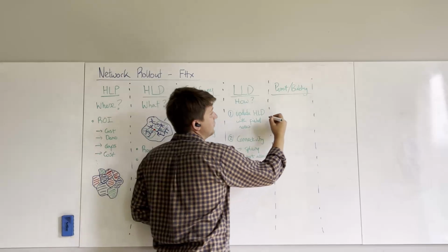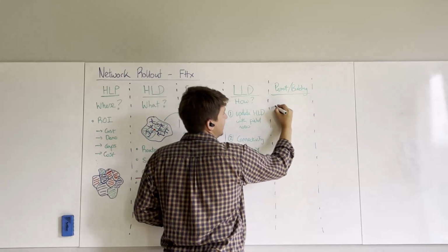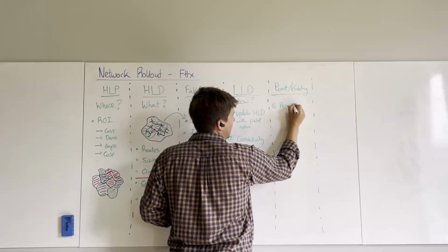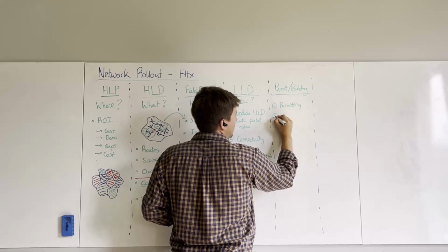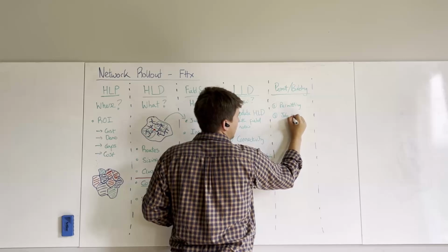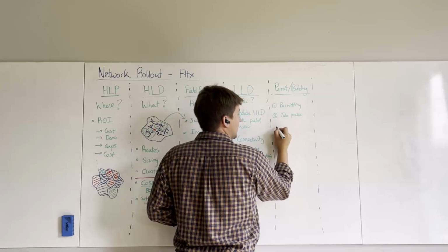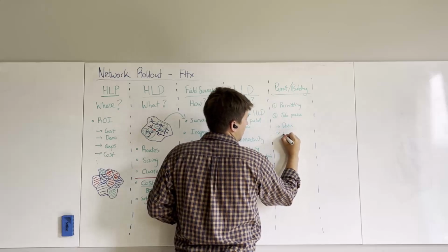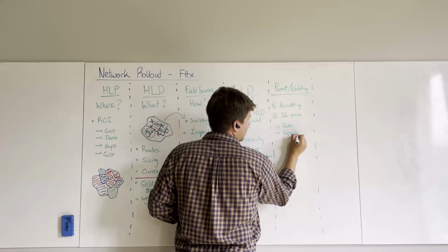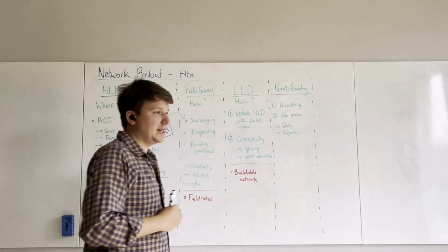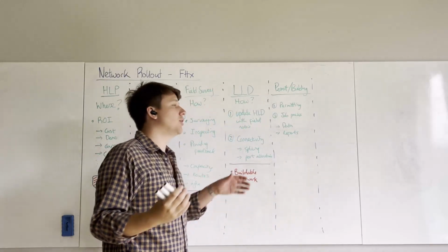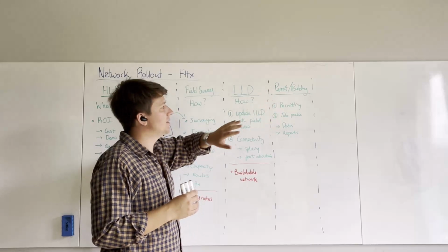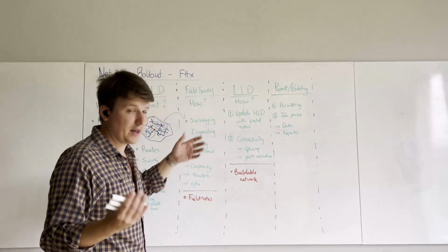But the supporting roles that we need to provide is, 1, getting permitting, and 2, creating job packs for build. Now, this is really about providing data and reports to the correct teams. So permitting, you'll probably need to give the local governing body some data to say these are the streets that you're going to be digging up, this is the work that you're going to be doing, can I do that or not?